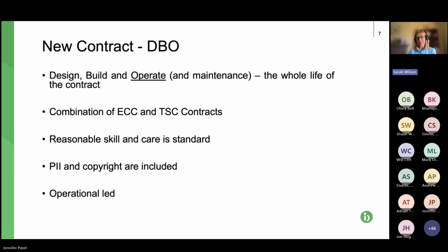So what I'm saying is if there's any element of design, that option should apply so that your standard of care for design is reasonable skill and care. It is only an option in case design isn't part of the contract. So if you've not got design, you don't need X15. If you have, you do need it. Simple as that. It's not negotiable.